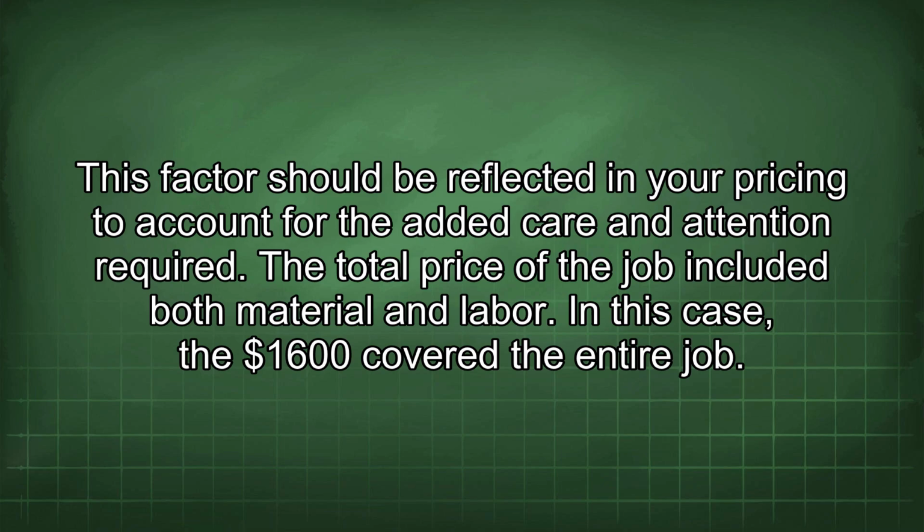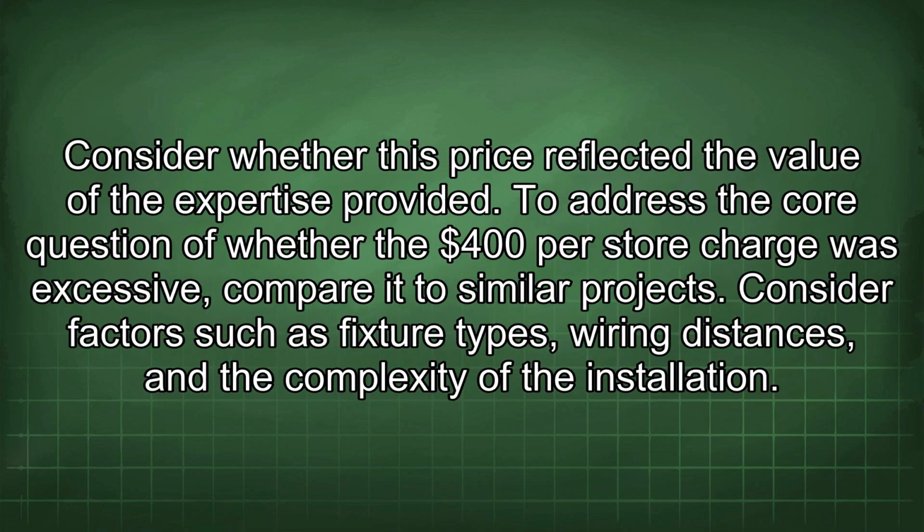The total price of the job included both material and labor. In this case, the $1,600 covered the entire job. Consider whether this price reflected the value of the expertise provided. To address the core question of whether the $400 per store charge was excessive, compare it to similar projects. Consider factors such as fixture types, wiring distances, and the complexity of the installation.